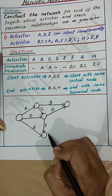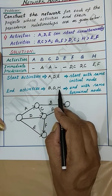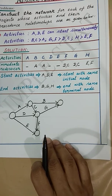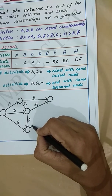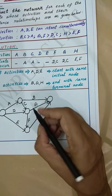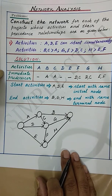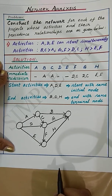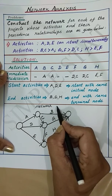Finally, we have activity H, which occurs after E and F, and it is also an end activity. Hence activity H should end where B and G end. This is activity H. So now we have completed drawing the network diagram.